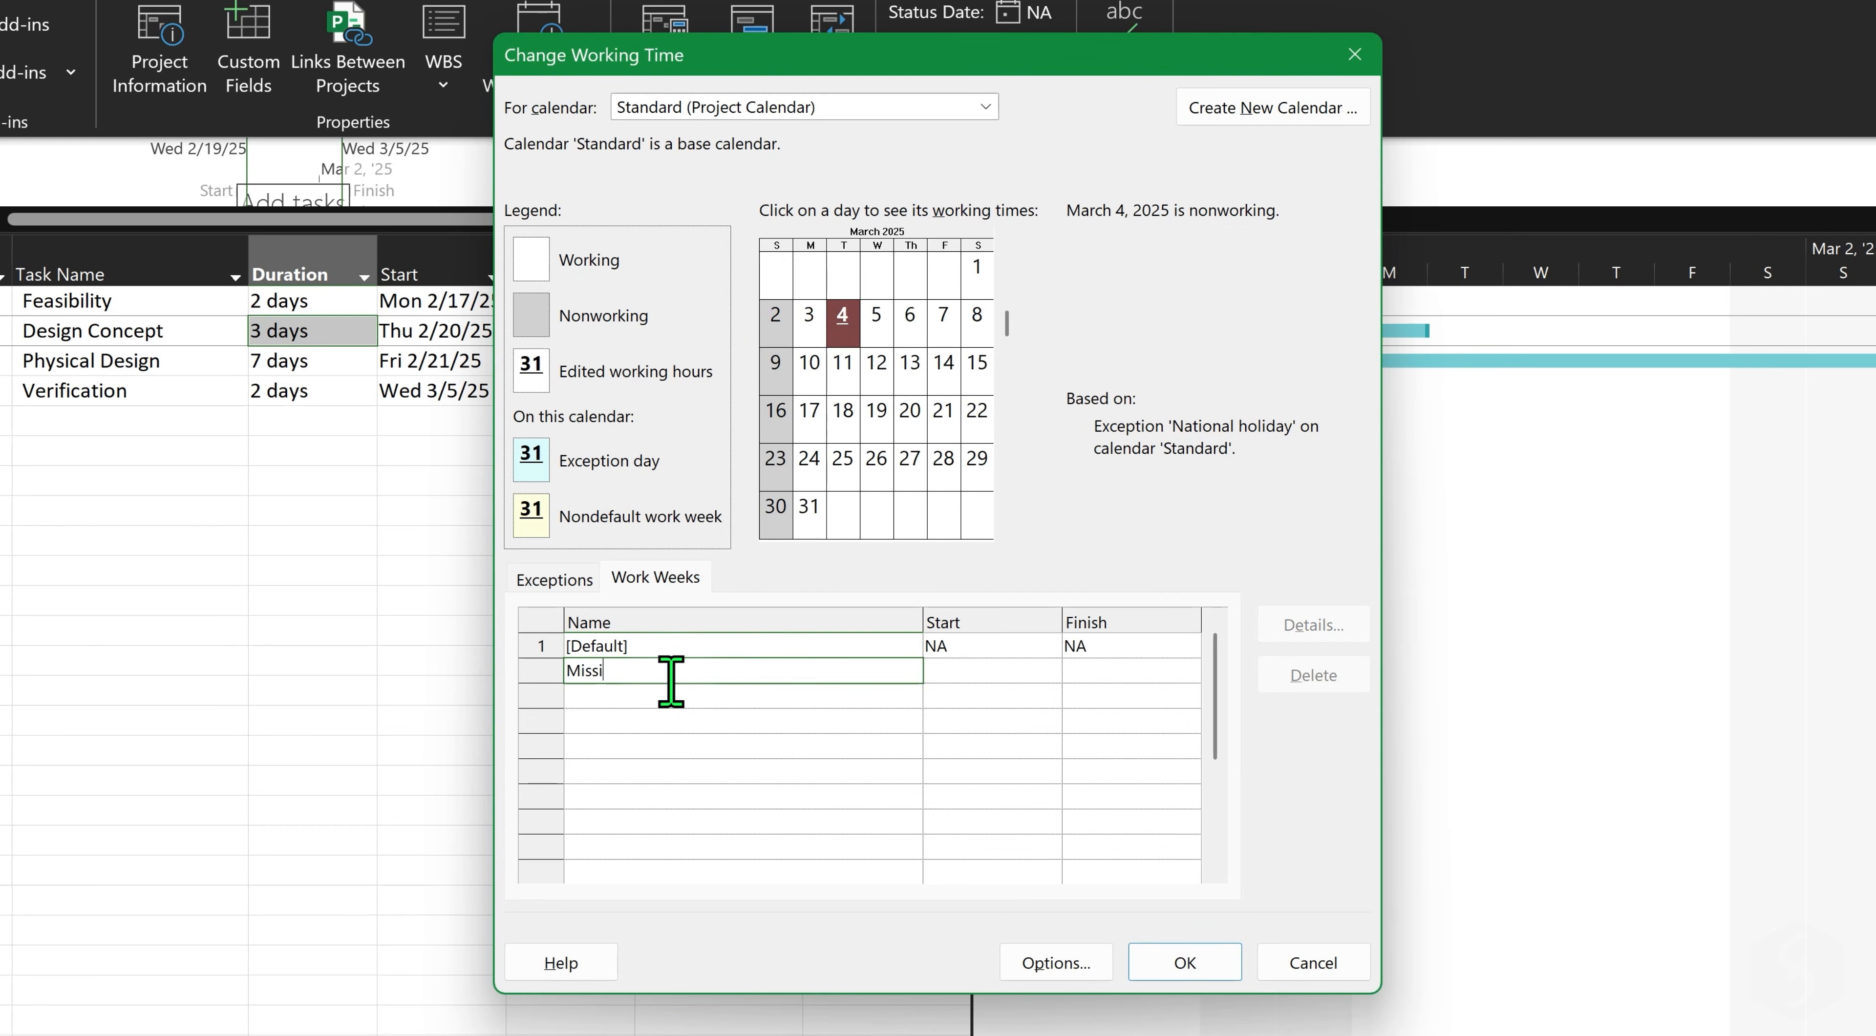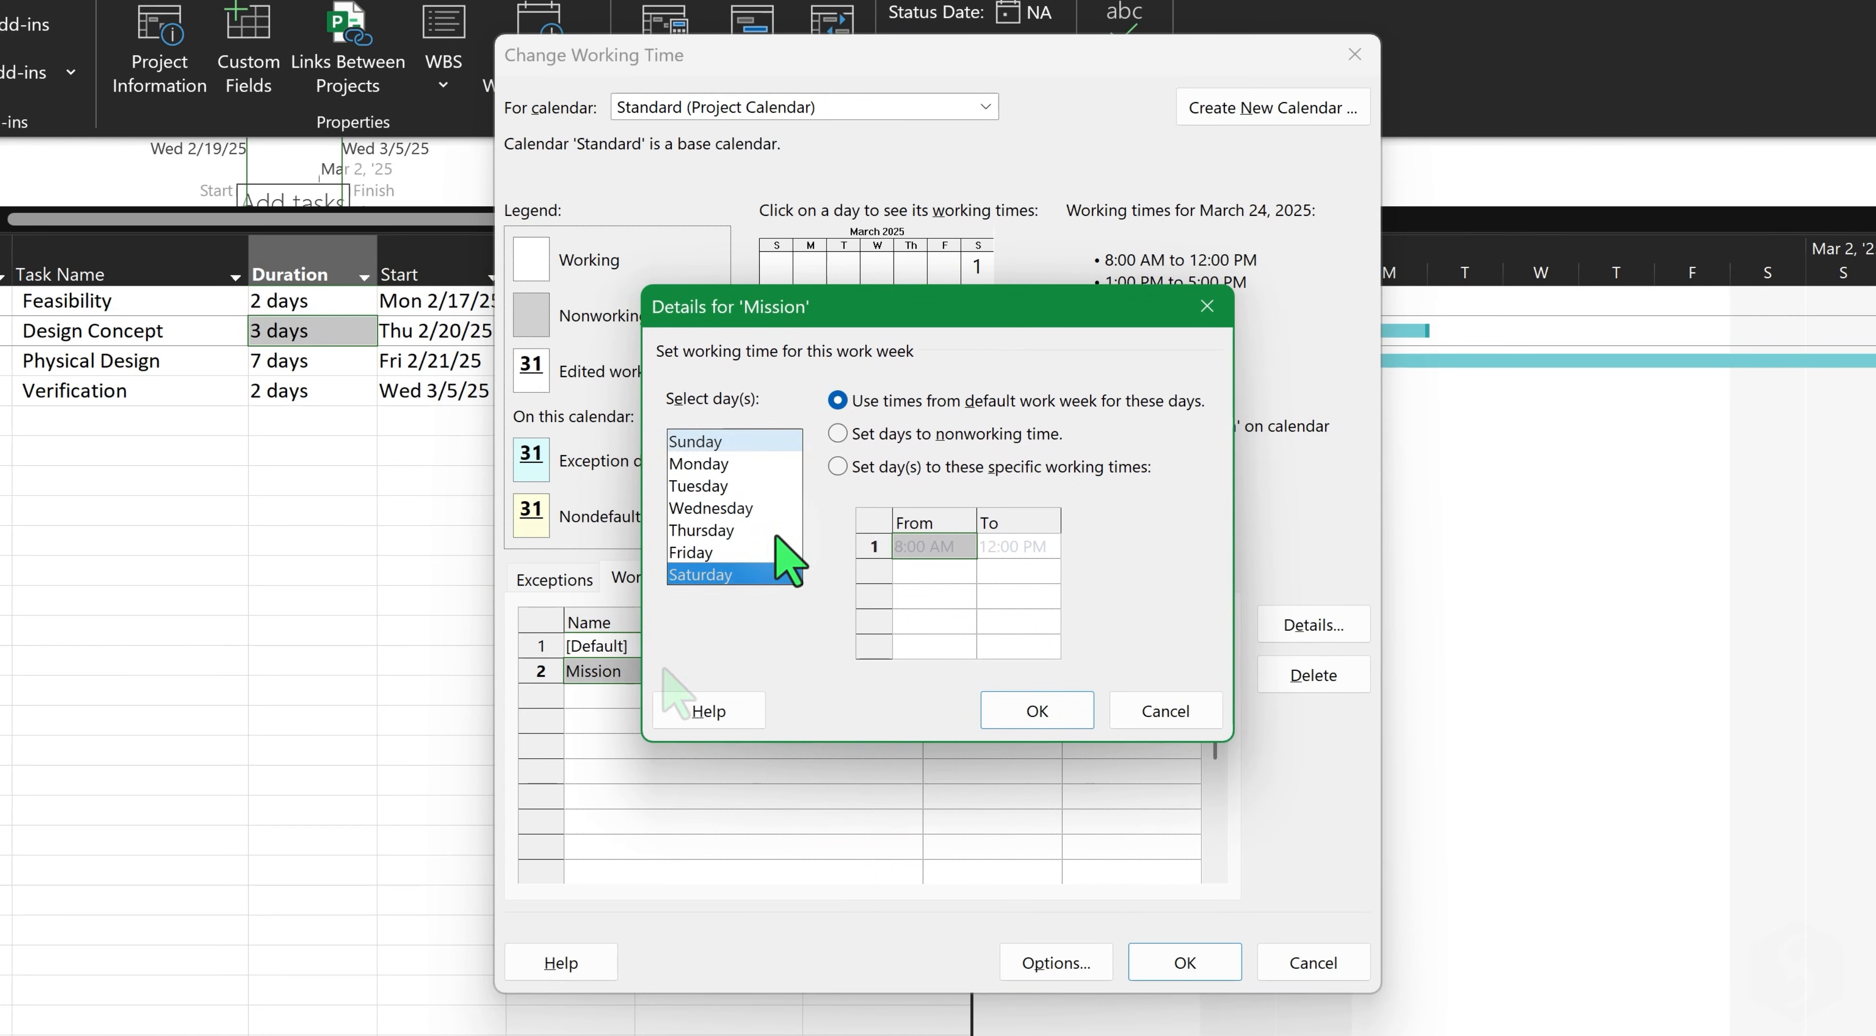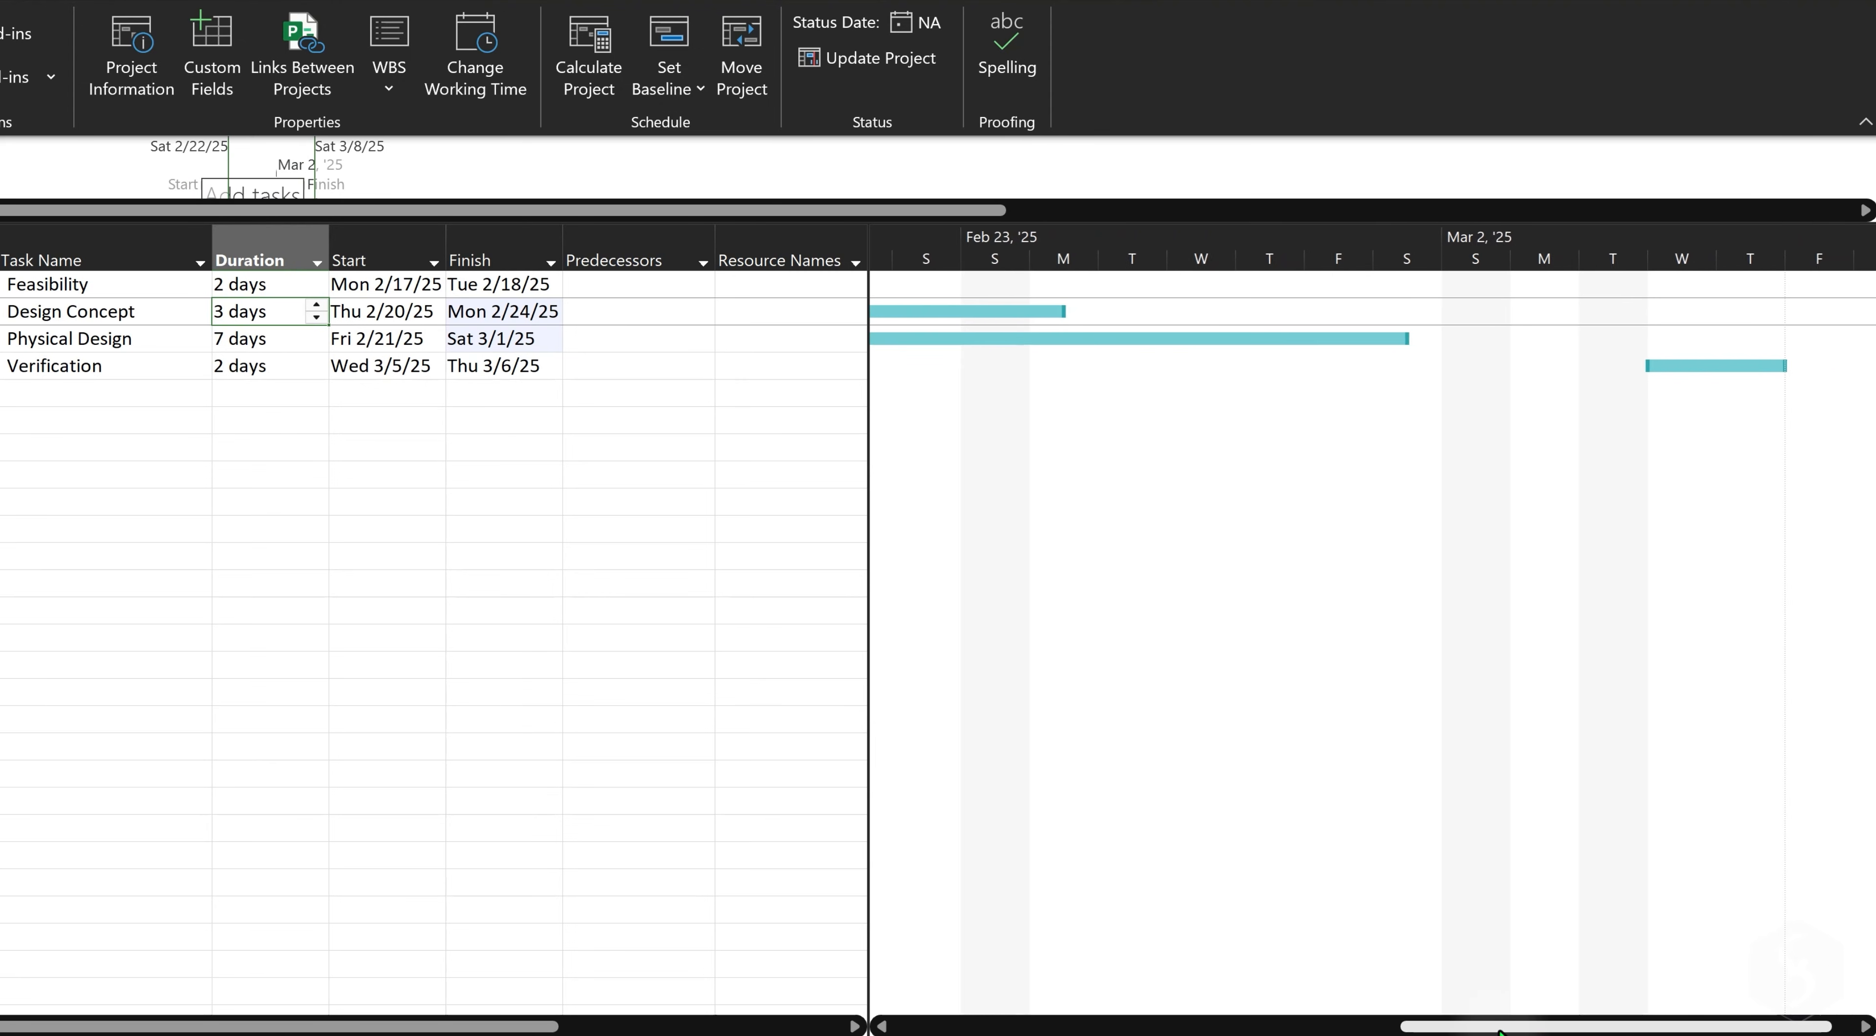Below the default period, define other special periods of working time, such as missions or transfers, that override the default rules set above, with other working days or times. Click on OK below to apply and update the Gantt chart automatically, getting taskbars shorter or longer according to the new working days and times.